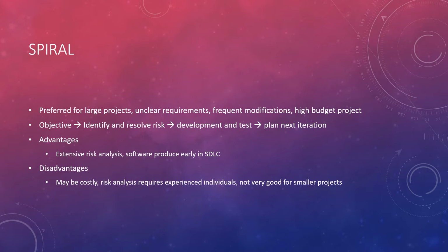And so advantages for this model would be extensive risk analysis, software produced earlier in the SDLC. Disadvantage may be it's costly. Risk analysis may require experienced individuals, so as we've known that risk management and risk identification is very important for a project's success, so having the right individuals who have the experience and skills to determine those will be helpful. And it's not very good for smaller projects, so these are more for larger projects.